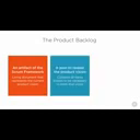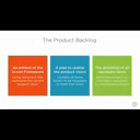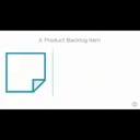It contains all items necessary for the team to meet that vision, such as user stories, current defects, or tasks. Although there are many types of items that can appear in the product backlog, when working with the Scrum framework, we refer to each of these items generally as a product backlog item. You'll see that each product backlog item has all of the information necessary for you to understand its intent. In particular, each item that Dave has added to the backlog contains a short description that captures its intent and a rough estimate. Let's talk more about the individual product backlog items.